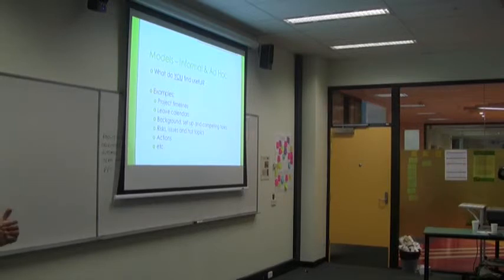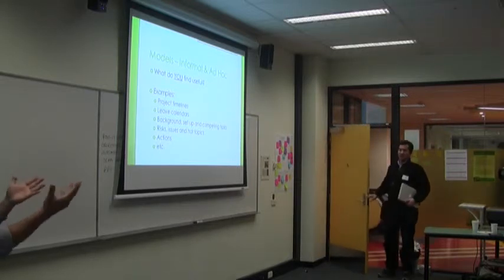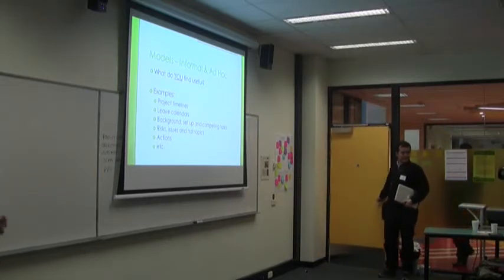Leave calendars became one of the most useful things, and we put avatars with little symbols for which days people were away on leave. And what I actually did was I colour-coded those stickers so that all the technical resources were blue, the BAs were yellow, project managers were red. So straight away when you looked at the leave calendar, you saw these little coloured stickers, you knew straight away if you had a low capacity of technical resourcing over a period of time.